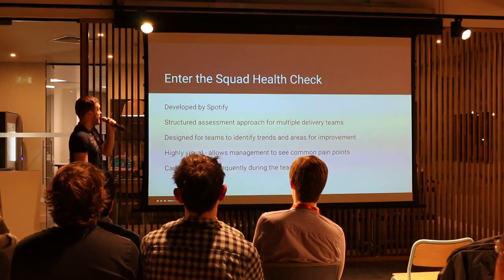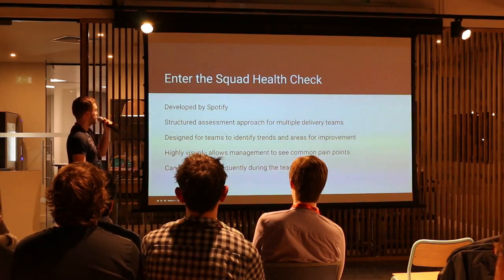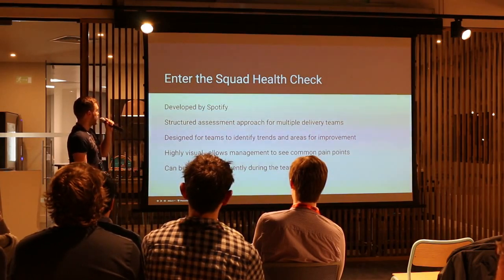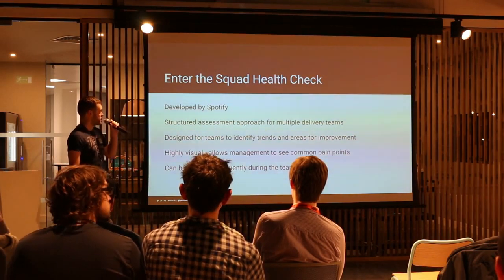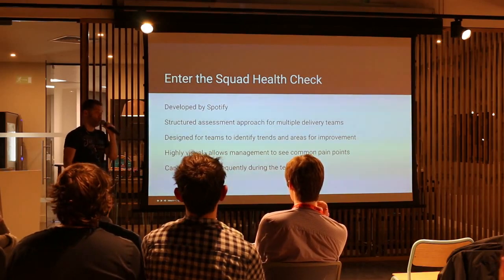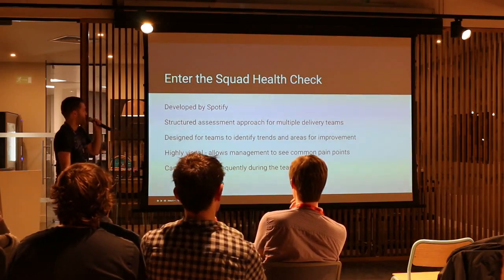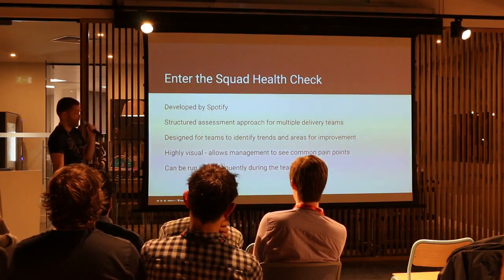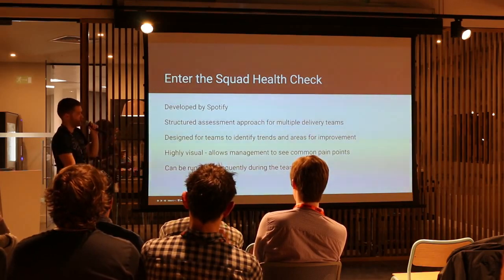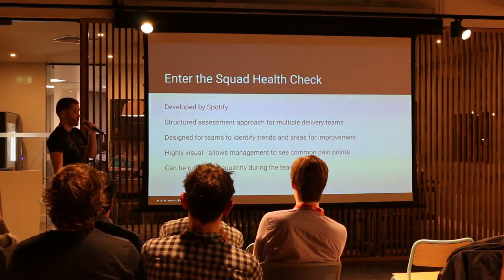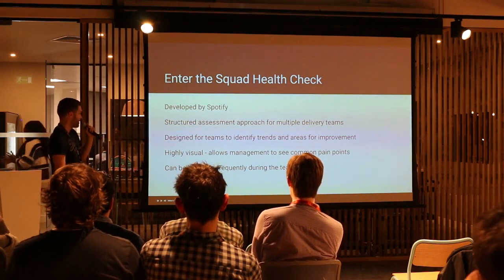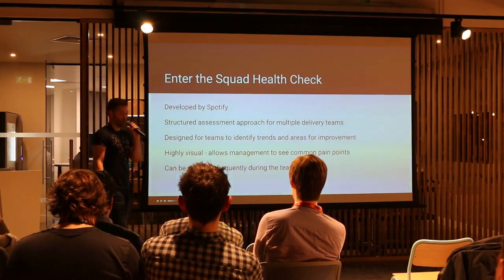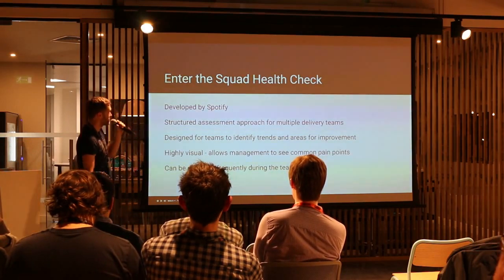We did a little research and discovered the Squad Health Check, which was developed — surprise, surprise — by Spotify. It's a structured assessment approach for multiple delivery teams, and you can run it with one team or with many. It's designed for teams to identify trends and areas for improvement. It also has the benefit of being highly visual, which I'll show in a second. And it helps management to see common pain points and systemic issues. As a result, it's more lightweight and can be run more frequently during the team's lifecycle — perhaps every two weeks or even more frequently.